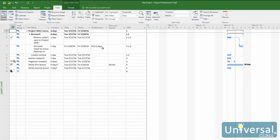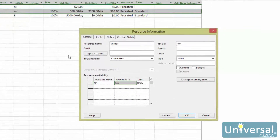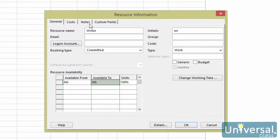Project 2016 has two ways that you can find resources within the program. First, you can categorize resources by skill or any other criteria using the resource information dialog box. To view this, go to the resource sheet. The resource notes area of this dialog box lets you jot down information about the resource's skills and abilities. To access resource notes, double-click on a resource name in the resource sheet view to bring up the resource information dialog box. Then click on the notes tab.